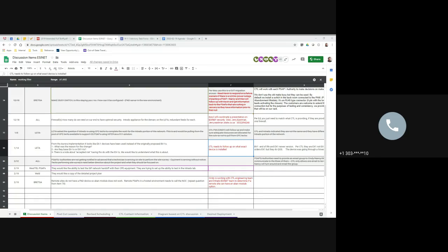So I got looped into this this morning. There's quite a bit of conversation going back and forth, and I'm working to set up a meeting with Intrado to walk through this specifically, hopefully later this week or early next week. I think there's a little bit of confusion on testing in production. We wouldn't generally allow testing in production, but there may be a window during that pre-production period where the network is up but we don't have live traffic on it that they might be able to test during.